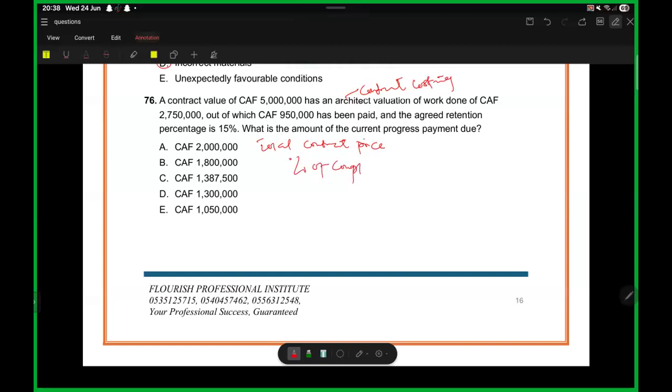The percentage of completion over there, so that you know that, okay, I need to receive like 5 million, and then I have 20%, or I have to receive 80% of it. And sometimes when the work is valued, there is an individual valuer who has to certify that the work you said you have done is done indeed. So if it is done indeed, we are going to pay you based on the work done. And that work done is where we use the percentage of completion to calculate.